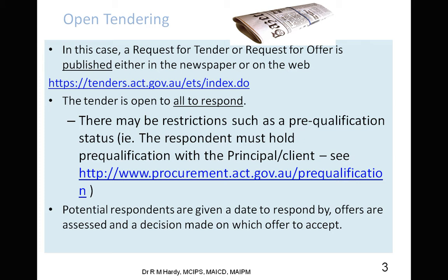Now, the process, they need to get the drawings. So in the old days, we used physical drawings. Basically, everybody got a set of paper drawings, and the tenderers, the builders who wanted the job, needed to give a deposit for those drawings, and the deposit was then refundable upon the return of the drawings. This is just a token sum of $500 to $1,000, really just so that the ownership of the drawings remains with the architect slash client.